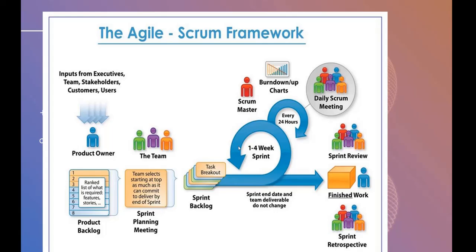And when the sprint is running, you cannot change the duration. You cannot add anything in the sprint, and you cannot change any team members. This is constant. That means you cannot change things inside. Although we are saying that agile always welcomes change, in the sprint you cannot change anything. It's fixed. The sprint duration is fixed, the sprint scope is fixed, and the team members are fixed.